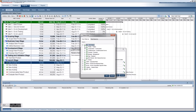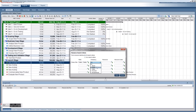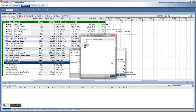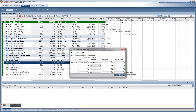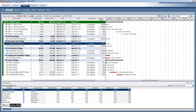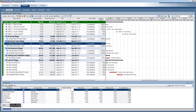Requesting a resource allows you to search for specific resources based on their role and proficiency. Once resources are loaded, you can see all assignments in the assignment tabs, assign at 100% for the planned duration, enter specific units, and ultimately calculate completion costs based on that resource's hourly rate.